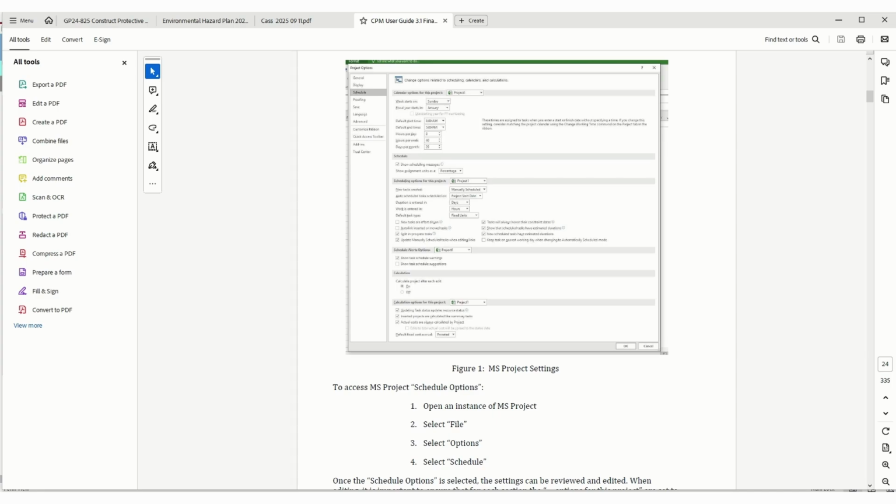If you do not check this, then your crew will still be able to be added and saved in the project. So that's a key factor: if you make it a duration CAD sheet in general, and then you try to go back, you'll have to add your resources in Microsoft Project. If you decided that it doesn't have to be a duration, and you do it before you click this, then you can add your resources in crew. So let's get back to our placing in concrete formwork.